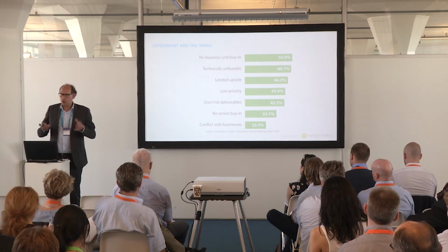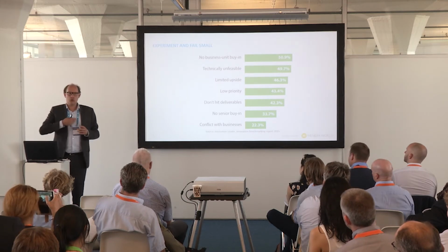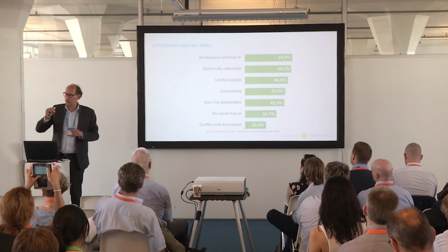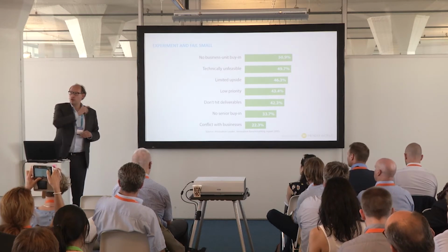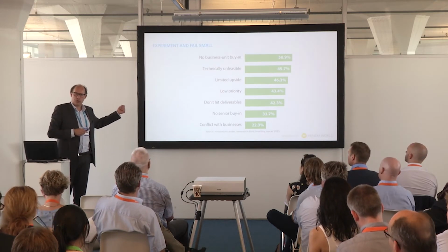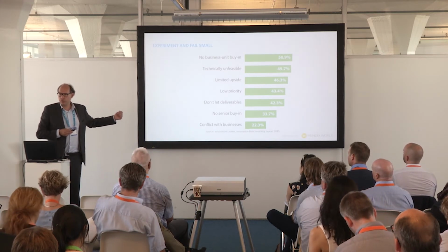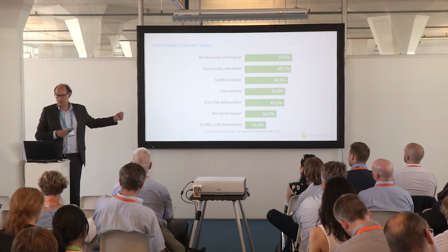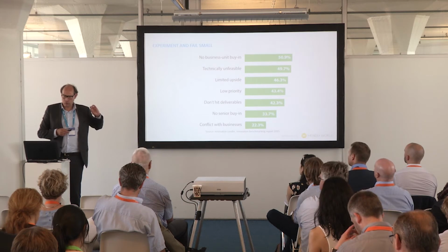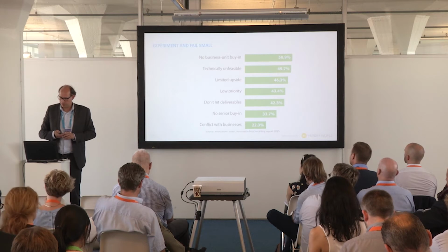Now, if you're using an agile approach and you're experimenting, involving your business, iteratively validating value and iteratively validating technical feasibility, this should not happen, not after a year. And I think 1/3 of the projects associated with this research had more than 250K sunk cost associated to them. So being very concise about when to kill a project is also something that you need to think about.